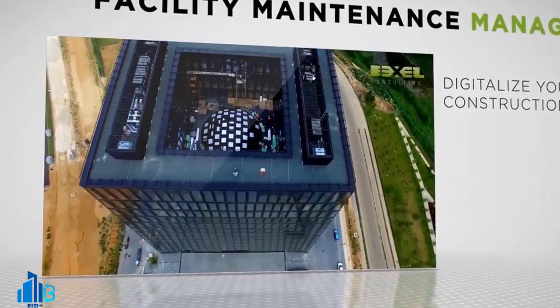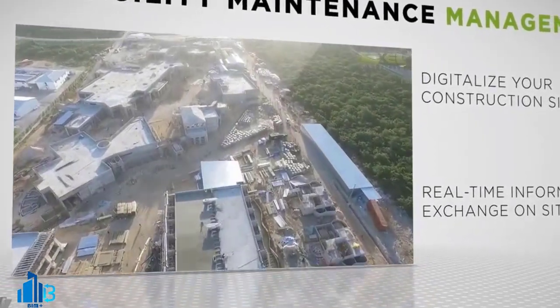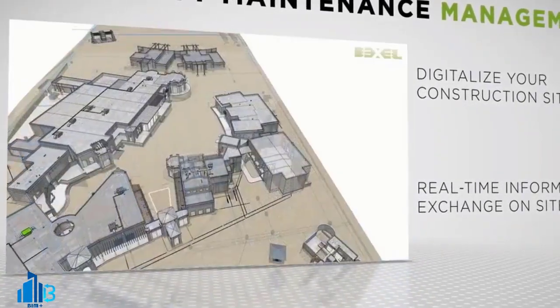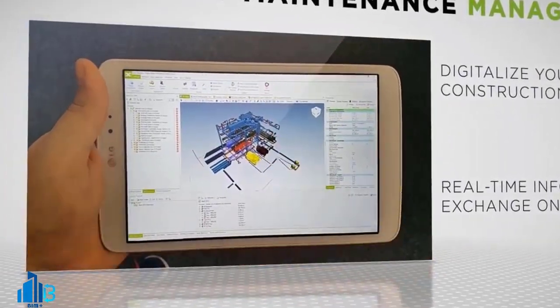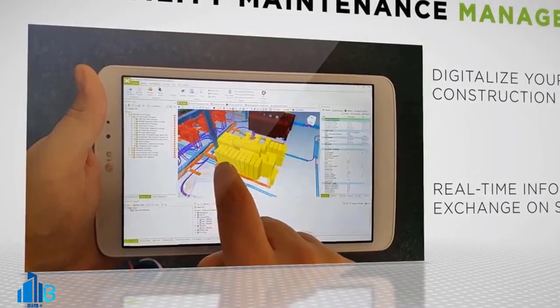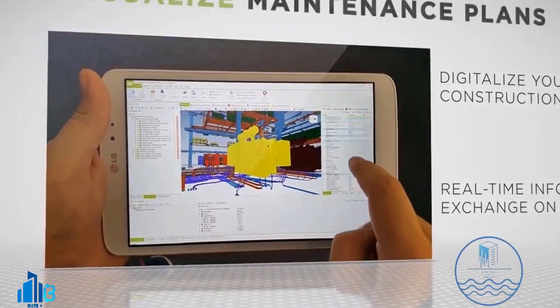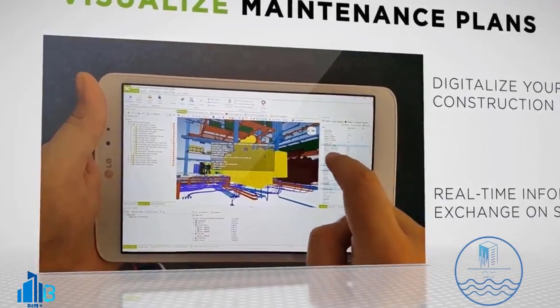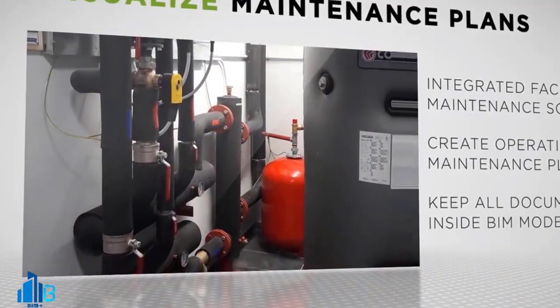Part number 6. Maintenance and repair phase. According to the statistics from the U.S. Public Service Organization, if the costs of a building are considered from construction to demolition in 40 years, about 29% of costs are spent on design and construction, and 71% on maintenance and operation.